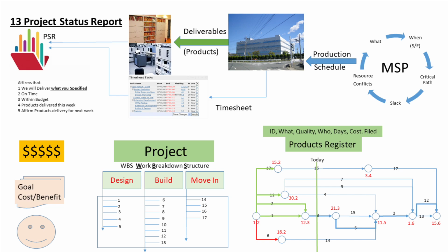And as for the third, by far the best way to inform the company about the project progress is visually, using the calendarized PERT, but color-coded to show delivery or lateness. Clearly, every activity leading to the circles to the left of the today line should have been finished. Looking at our example, notice that the delivered products are shown in green and the late products in red.